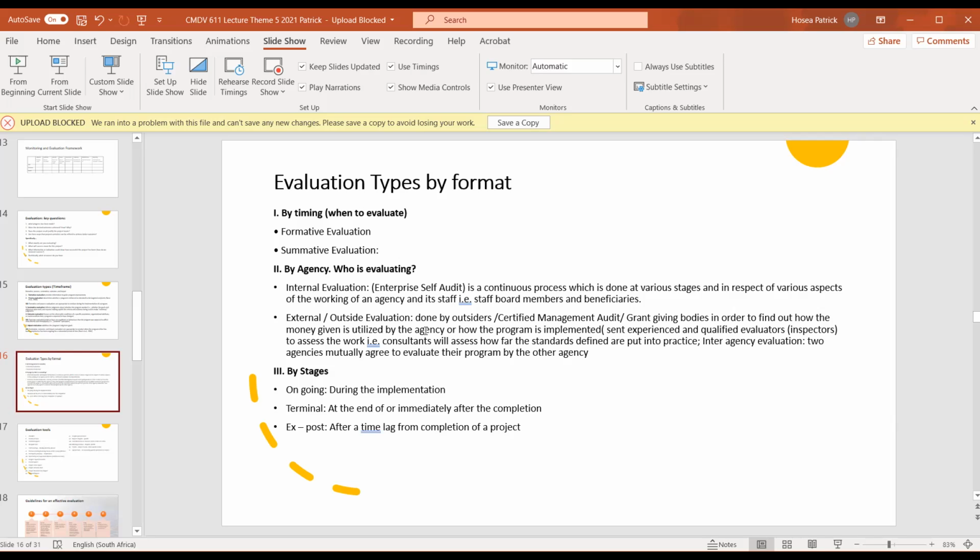When we look at the formative evaluation of that project, in the course of the project, we knew that we trained 50 people in 6 months, and we trained 100 people in 1 year, right? At the end of the project, after 1 year, we realized that we have trained 100 people. So the first evaluation we did in 6 months was a formative evaluation because it was done while the project was ongoing, because it was a 1 year project.